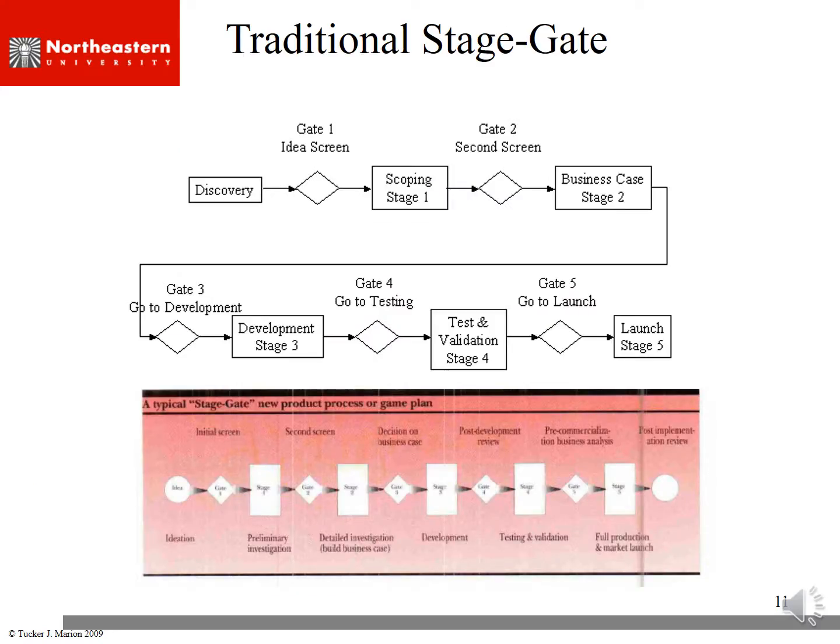This is a traditional serial stage gate model where again everything was linear. Do this, when this is completed, do that, when that's completed, do that. Very linear model. Takes a relatively long time to bring a product to market. Again, we could take several years to do an electronics product in the past, and now we look at a target of 9 to 12 months to go from concept to finished product.